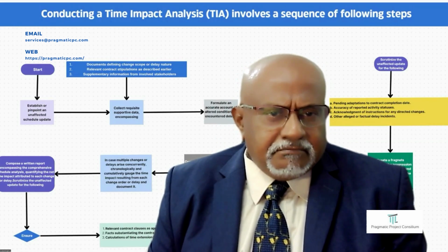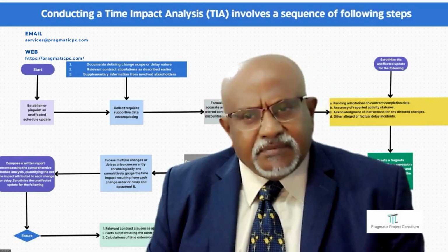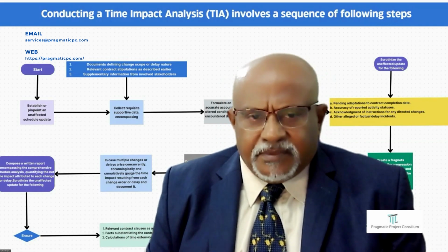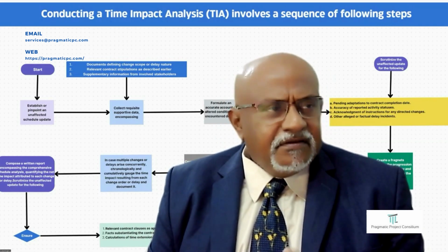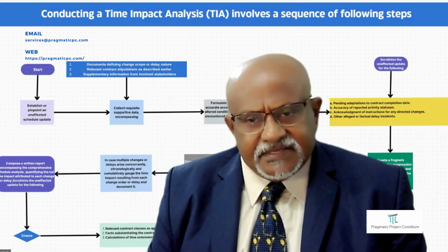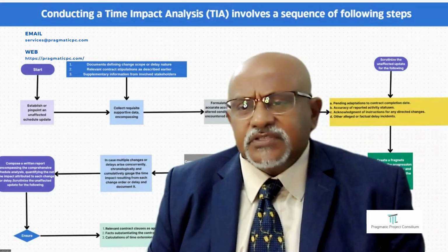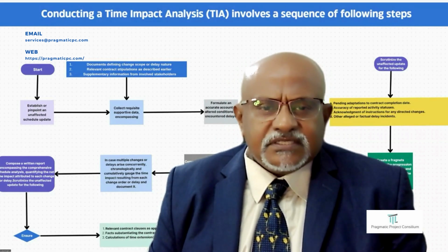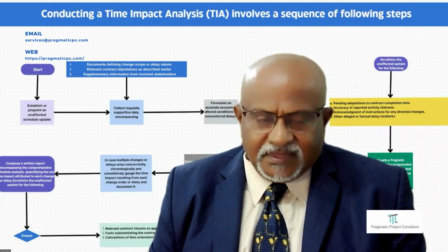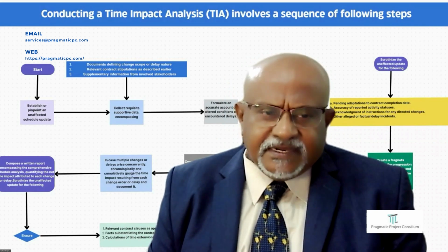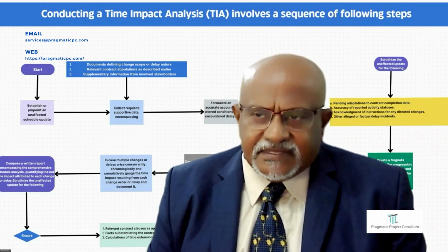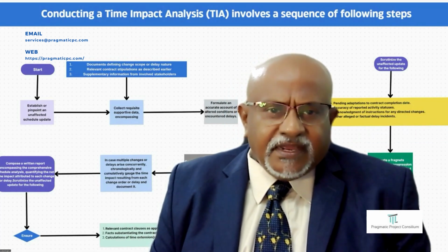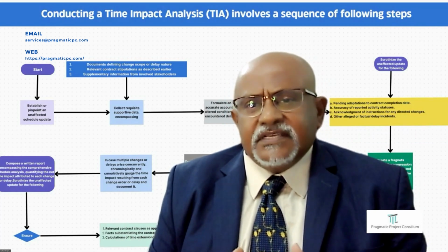enabling its use without a baseline schedule for updates. When appropriate project information is accessible for the TIA analysis, this method is typically chosen provided the contractor possesses sufficient resources and expenditure. Now, considering that the TIA delay analysis is a favored methodology and